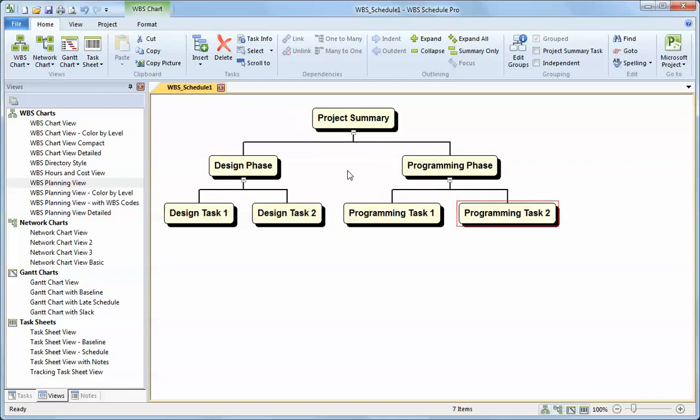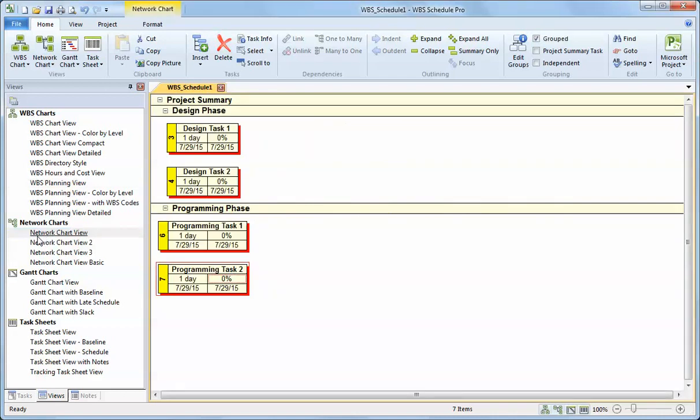So once I've created the tasks in my plan, I can go to the network chart and create the dependencies. The network chart shows the structure you defined in the WBS, so it shows the phases as horizontal bands across the page, and then it has the tasks listed as boxes.